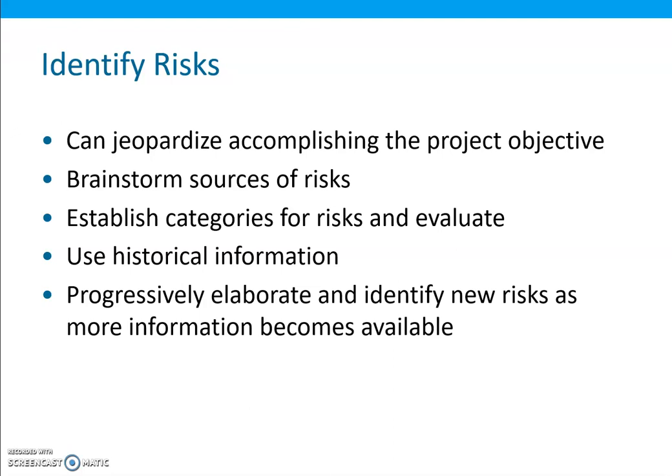And the final risk category is sponsor or customer related risks. For example, sometimes there are delays in approvals, and there may be uncertainty about the security of sponsor funding as well.